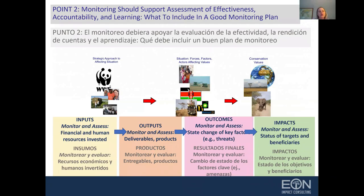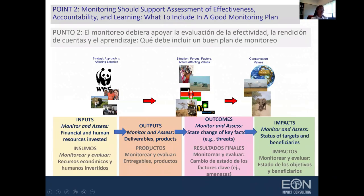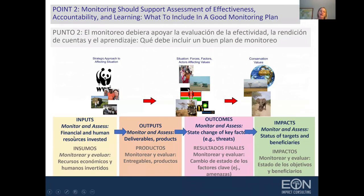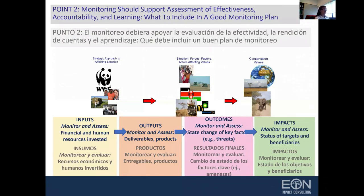For the work that the program is doing itself, you want to monitor outputs — are you actually producing what you said you would produce? Entonces, los productos: ¿efectivamente estamos produciendo lo que habíamos prometido que íbamos a entregar? And you want to track your expenditure of human and financial resources. Y también hay que seguirle la pista a la inversión de recursos financieros y humanos también.